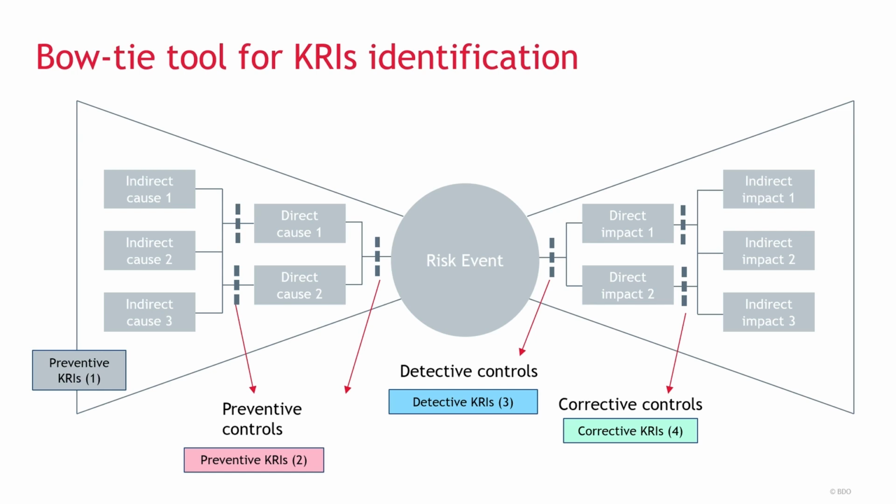The first one is the fact that KRIs, leading KRIs, are metrics of risk drivers. So once you understand the causes or highlight the cause in a bow tie analysis, finding a measurable proxy for this cause, a measurable proxy of tiredness of employees would be vacancies, long-term vacancies in small teams, or would be overtime over a cumulative period, for instance.